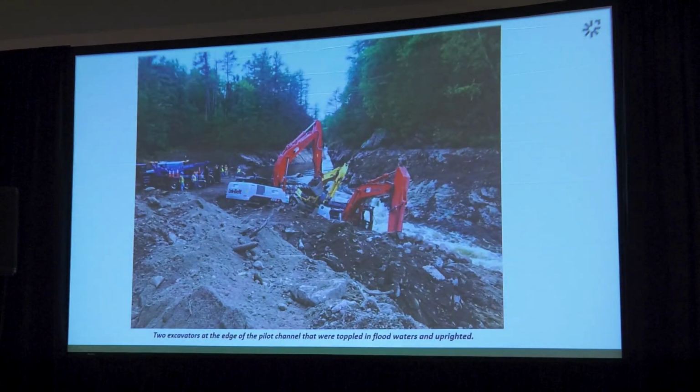Because if they don't, sometimes there's catastrophic consequences. So this was a project where Roy told these contractors many, many times that they couldn't be leaving their excavators right next to the river, they needed to drive them up to higher ground. Unfortunately there was a big storm, and there was some erosion next to them and they tipped in. There was no catastrophe here, but it was kind of a big deal at the time, and something that really set the contractor back. So having that relationship and making sure that people understand the flashiness of a stream and what could happen after a rainstorm is really important. We've seen that firsthand.